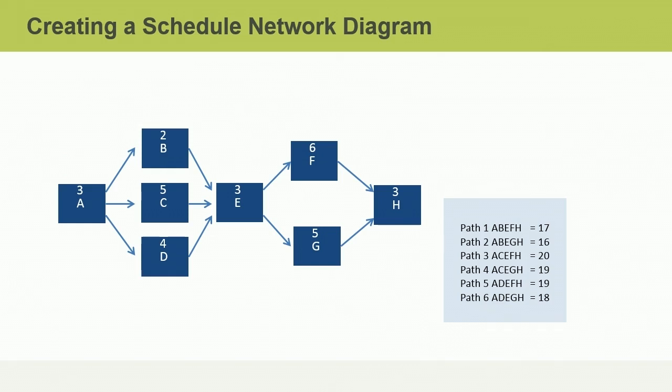Now I will show you the shortcut. Let's start with activity A. Activity A is on all paths, so we will count its duration of three. Next, we have three activities happening simultaneously. We will choose the activity with the longest duration. That is activity C with a duration of five. Activity E is on all paths, so we will count its duration of three. Activity F and activity G happen simultaneously, so we will count activity F with a higher duration of six. Activity H is on all paths, so we will count its duration of three.